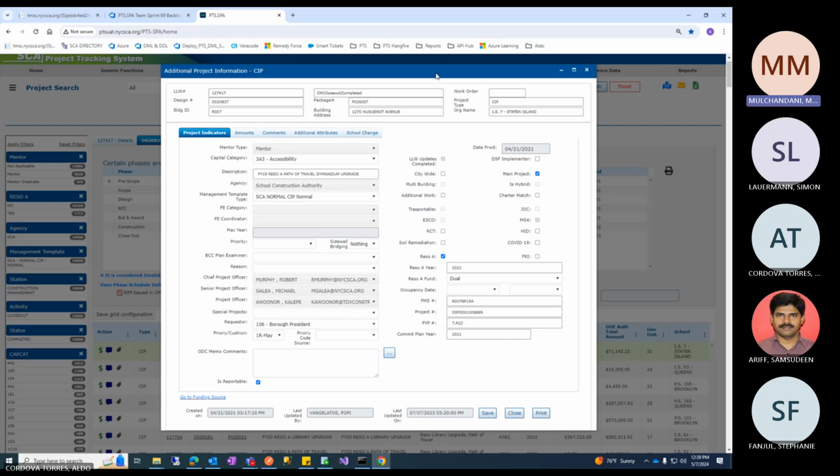So usually the status when you see it is PC, PS, AC. PC, PS, AC is the starting status, where PC stands for project controls, which on today's date they call ODC. I think they were called the project controls department before. So it's project controls, pre-scope, PS stands for pre-scope, and AC, and also IN, where IN stands for inbox, AC stands for active, and CX stands for completed. So in this case, it will become PC, PS, CX, which means it's completed and ready to forward.